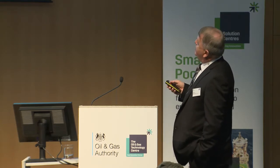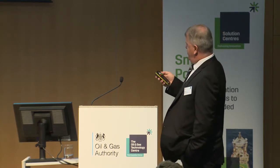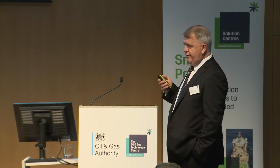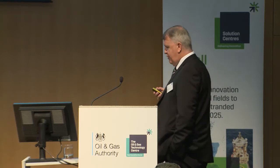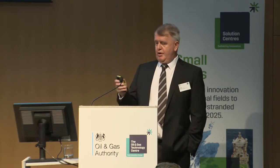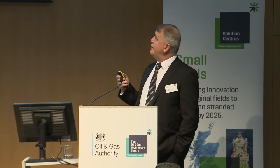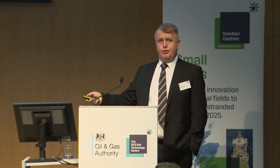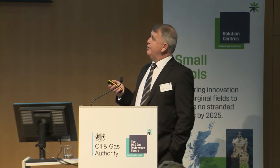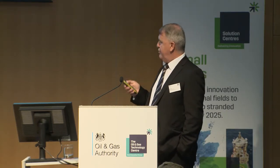You can move that, that one up there. That's phase capex. Yes, as I was saying, you can plan to phase your capex, so you can put the basic amount of equipment you need on the deck when we go offshore first of all, and then come back in after year one, two, three, four, whatever, and add additional modules or take modules off. So it gives you the flexibility to, we call it a bit of a Lego set, but that's what it's designed to do.